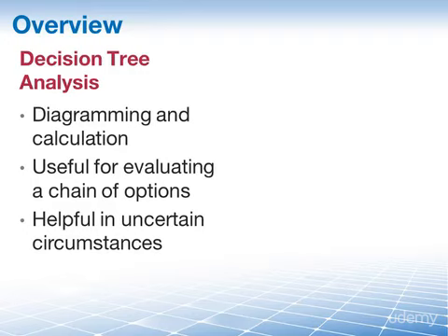It incorporates probabilities and the costs or rewards of each logical path of events and future decisions, and it uses expected monetary value analysis to help the organization identify the relative value of these alternative actions. And that's important. The decision tree uses the expected monetary value analysis. It's included in it, usually.